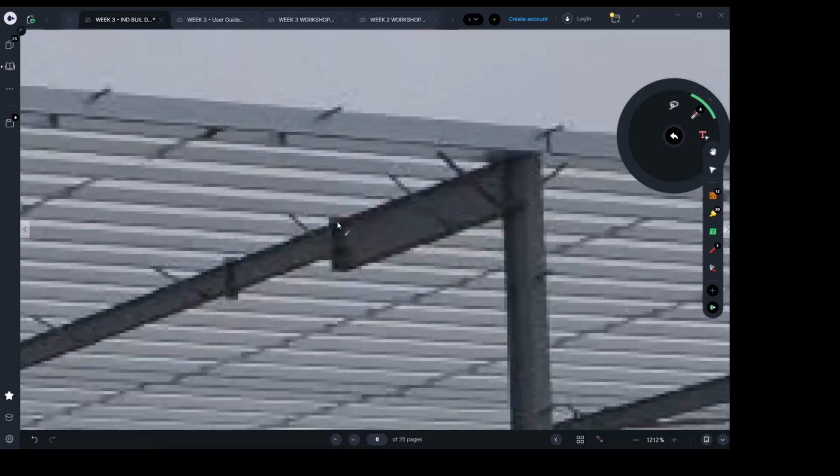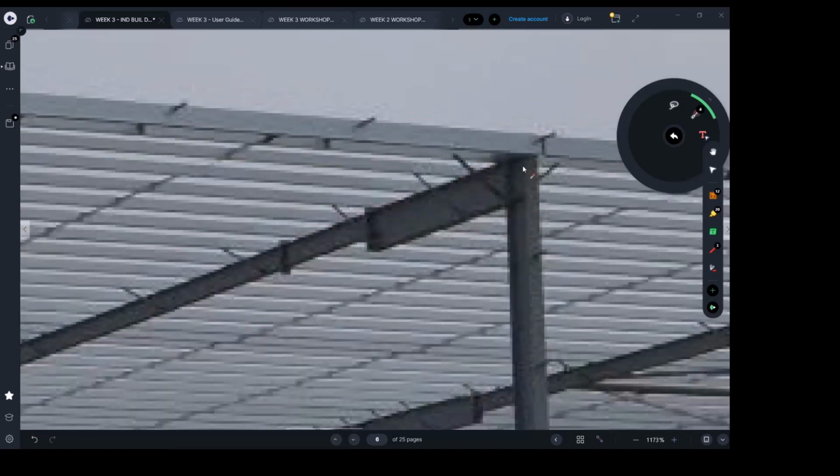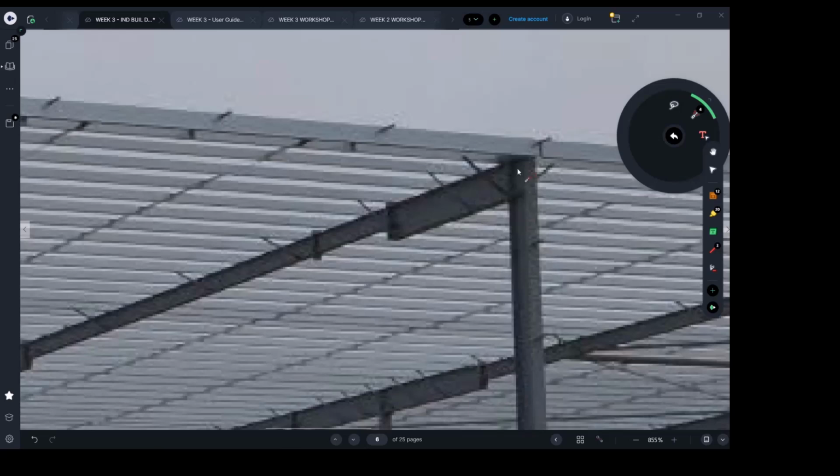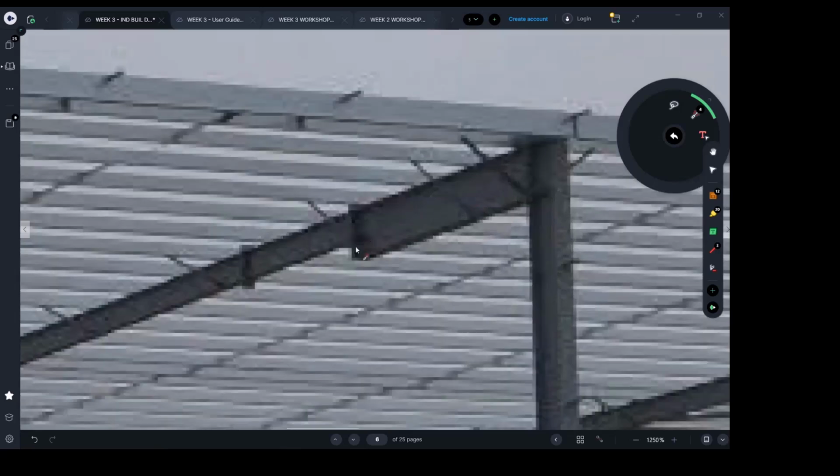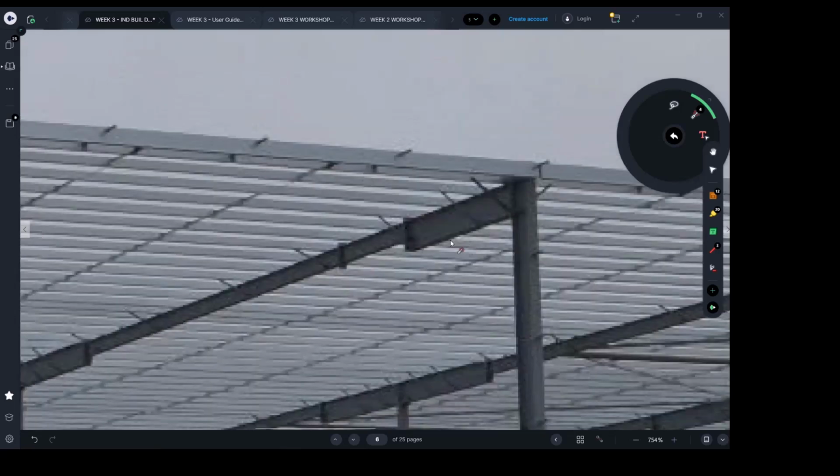They say, why do I have to cut it here and then snap it here? Let me just make it a big section and then reduce it. Usually the contract and the time spent doing the work cost more than the material, so I don't need to have the look I showed you.